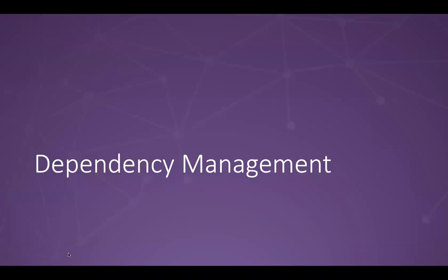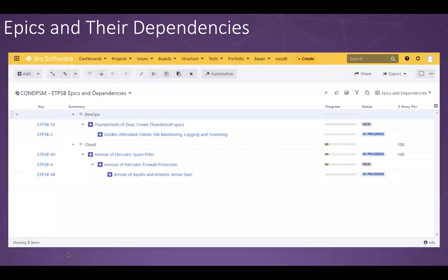The next area that I'm asked a lot about is dependency management, which in my experience in project and program management has been one of the biggest challenges facing a lot of different corporations. And so I wanted to create really simple views saying what's related to what. That's what I wanted to know. What's dependent on what? Now we're using the issue links that Phil talked about earlier, specifically the is blocked by / blocked relationship. And so relying on that as a way of saying, this is how we define dependencies.